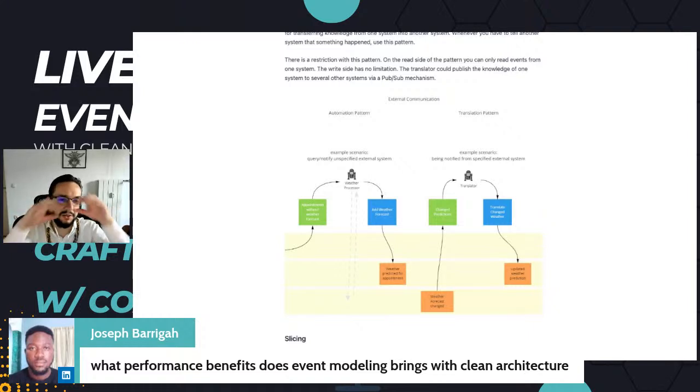And in clean architecture, you can just imagine the pie, and you're just filling up the slices of the pie. Then you can decide, well, this slice is the closest to the UI that the user wants to demo, right? So then you can put them together, and in order for it to function, it needs this data, and in order for that to function, it needs this data, right? So you can follow and put your project together in a way that you can follow progress visually, or that you can demo often.